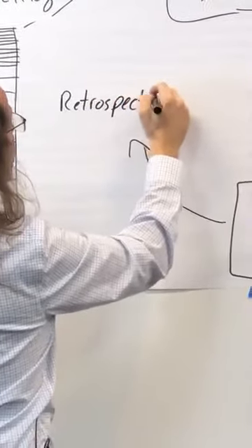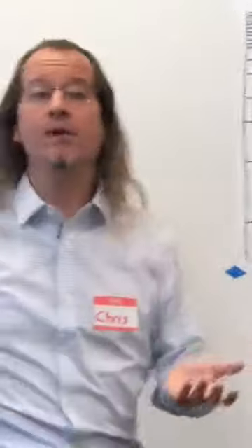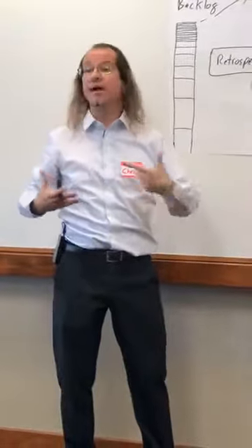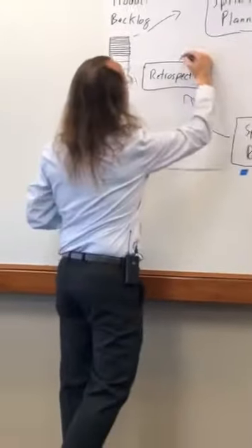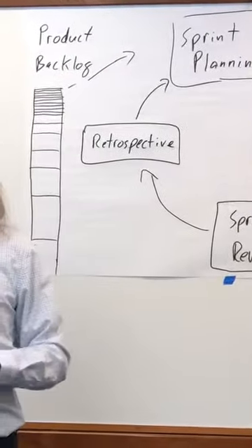And in the sprint retrospective, we're trying to figure out how we can improve as a team. What can we do to become a better, higher performing Scrum team? The outcome from that is going to be some tasks, some work we're going to do next sprint that we think will implement some kind of improvement that's going to help us become a better team. And we want to load those tasks in even before we do our sprint planning.